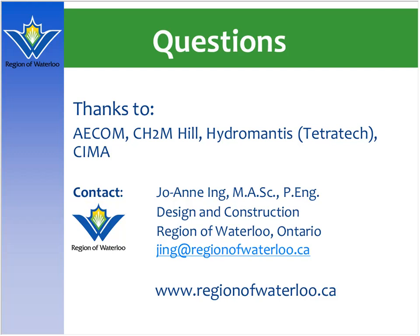Okay, super. Second question is around the tender models. And the question is, was there a clear choice between the three tender models, the DBB or the DB, and the third option? Again, I think because the region had lots of experience with the design bid build model, and again with the ability to review information at the different stages of the planning, the detailed design, and the construction, this provided the region with a little bit more control compared to, say, the design build approach.